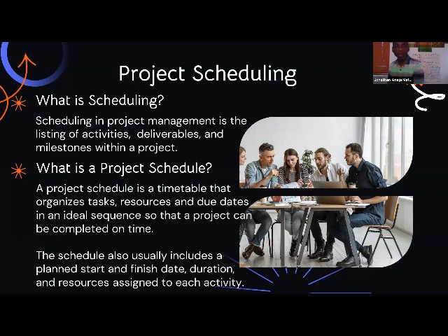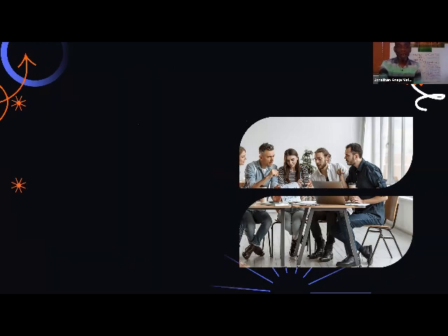The schedule will also include plan start date, duration, and it can assign resources. With this scheduling software, you can put in the quantity of cement, quantity of iron, quantity of stone, quantity of sand for each activity. Then when the procurement department wants to procure, they can go to that software. It will aggregate all of them, whether it's in wheelbarrow, whether it's in tons, and tell the procurement the total volume of sand or stone to procure. So it's a very, very important tool for anybody who manages projects to know.